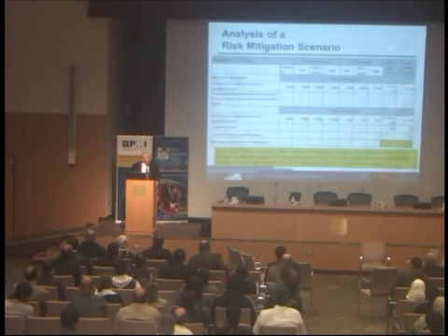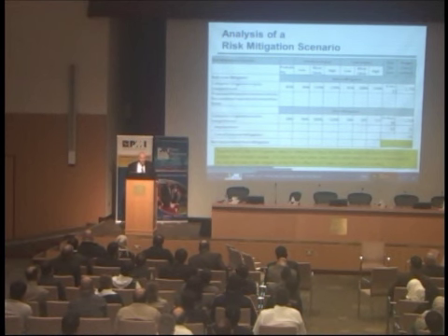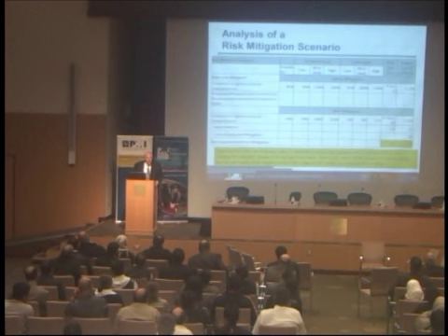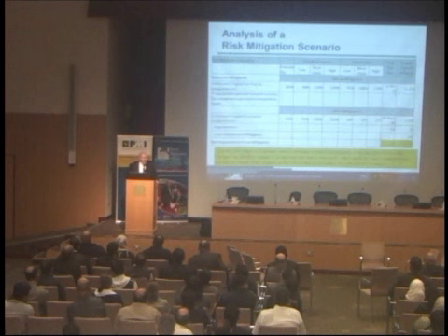You have to put it in the budget. You have to put it in the schedule. If you need higher level management approval, you've got to get that. You have to actually do it. It's not going to help your project just to think about it and put it in a model and put it in a report. You actually have to do it. And then you have to assign somebody to monitor it, and that person has to report back to you.